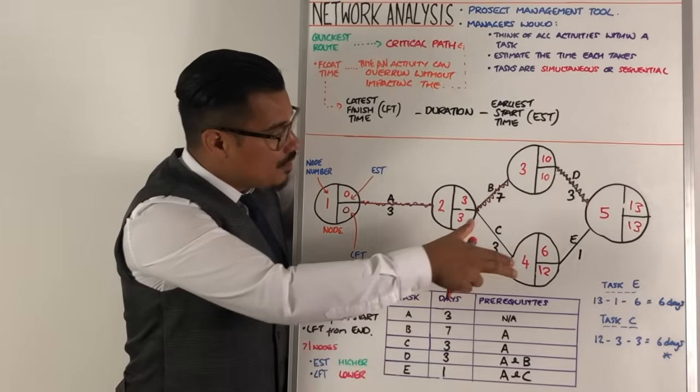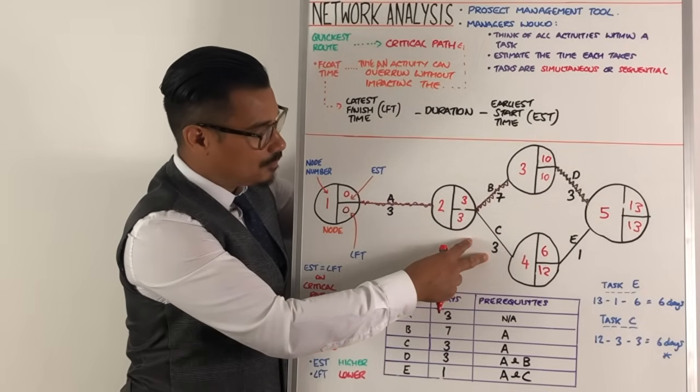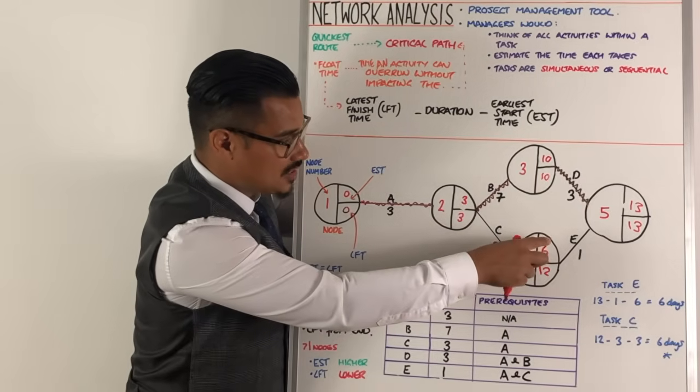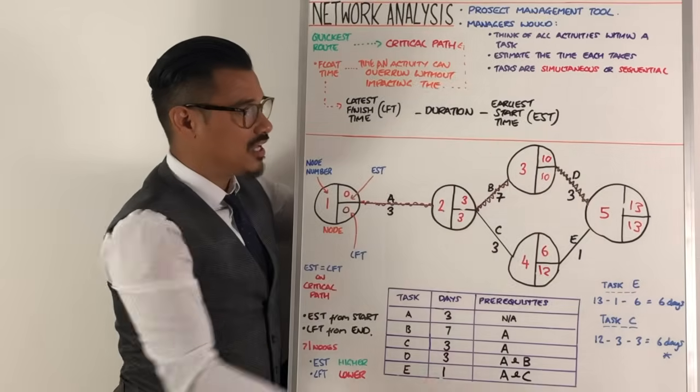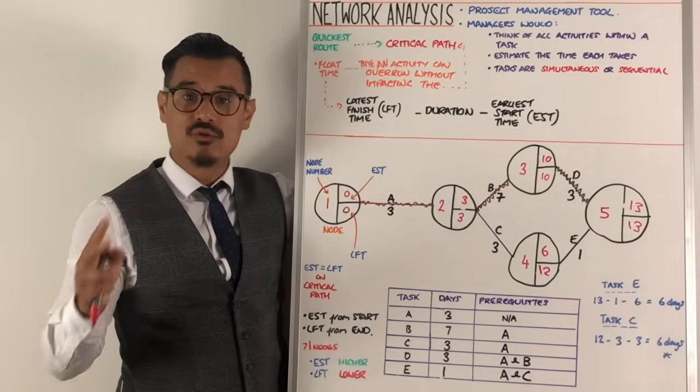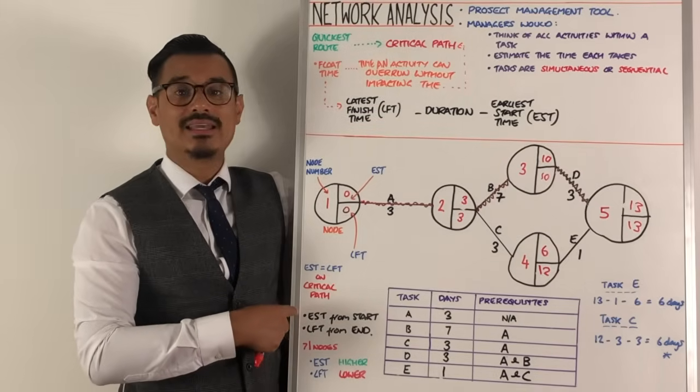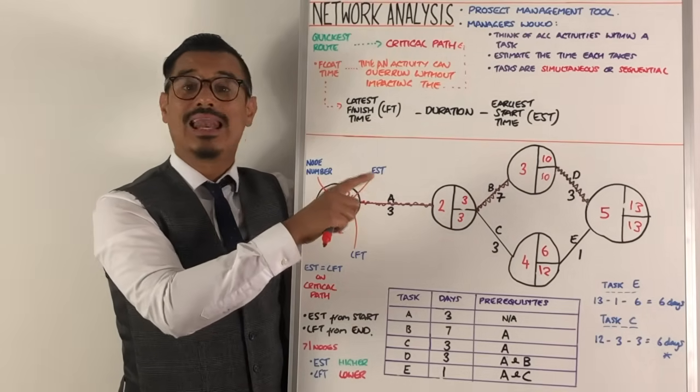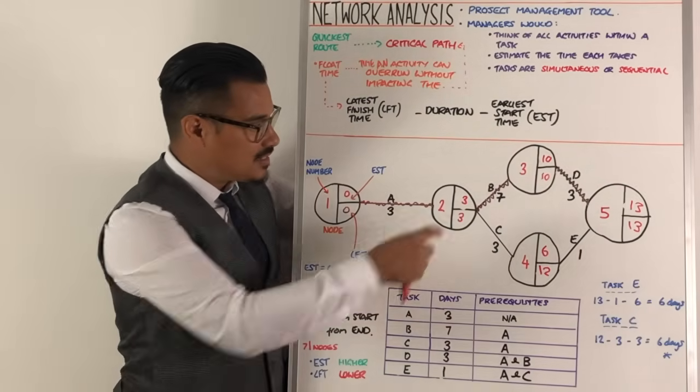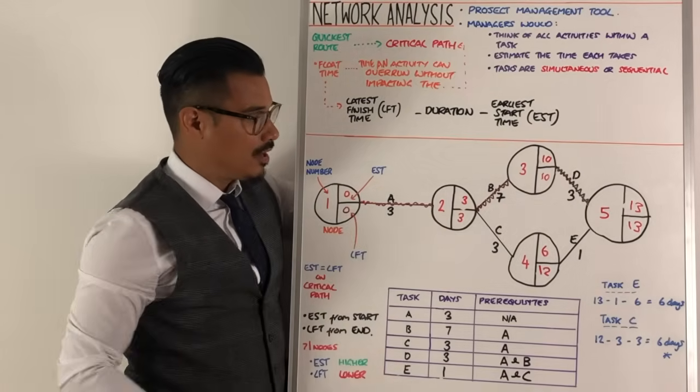However, recognize that if you did max out that float when you were on task C and you took an additional 6 days, that means that when you get to task E, you have to do it in one day in order to keep on the quickest route and that critical path. So key things to remember before we move on is that if the EST equals the LFT, that's the critical path. If you're calculating the EST, you move from start to end. If you're calculating the LFT, you move from end to start. And when there are multiple nodes, if it's the EST, take the higher number. If it's the LFT, take the lower number.